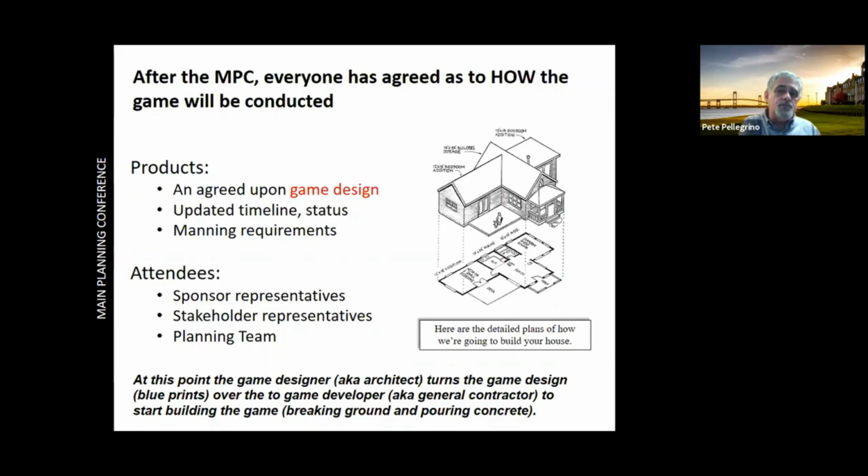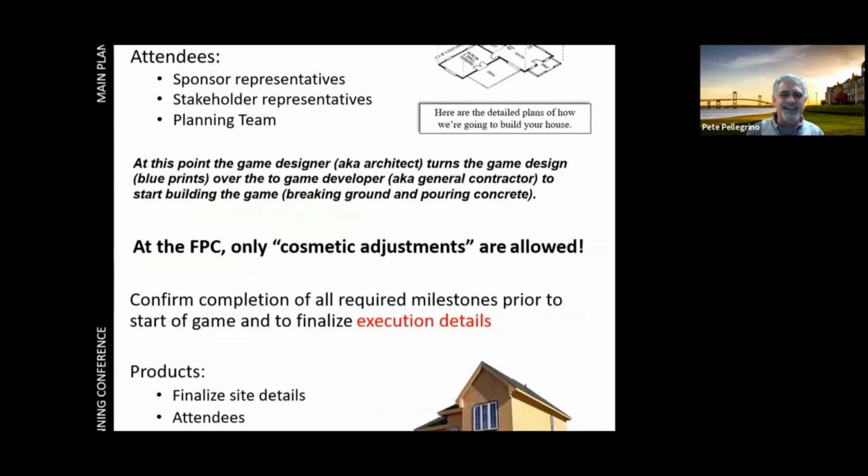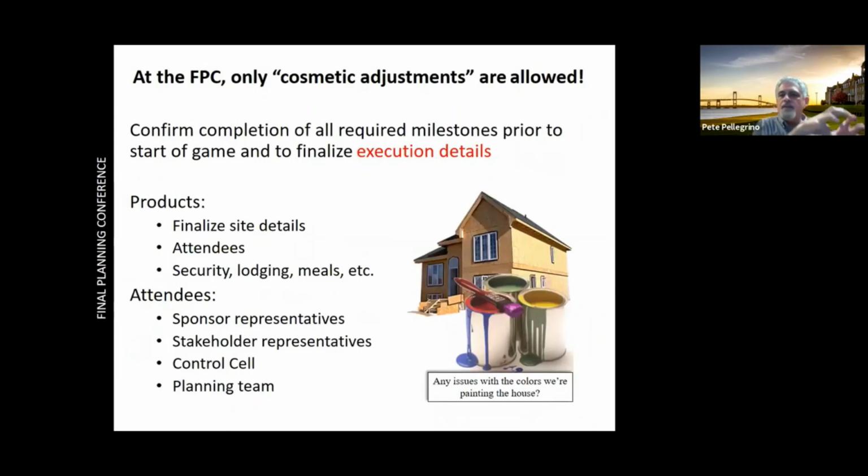And the more time that goes by after they start work, the harder it is to make changes. Because they're going to pour the foundation. They're going to start putting up the framing. And at some point, you suddenly say, whoa, hang on, I've decided I want a basement. I've already poured you a slab. There was no basement in the original design. So the sponsor needs to understand that at this point, change starts to get hard. And I'll show you why they don't believe this. But that's coming. So now having gone from that, we're going to start breaking ground and we're going to build. You're good? Okay, we're all going off to build.